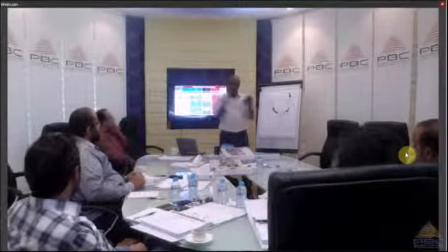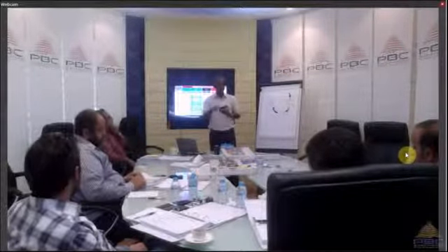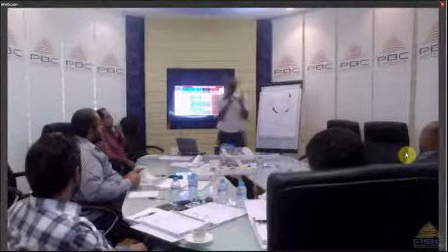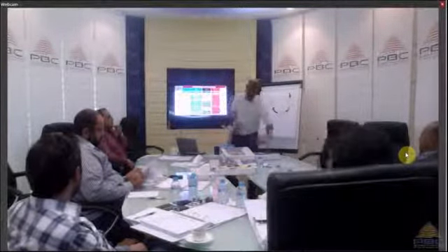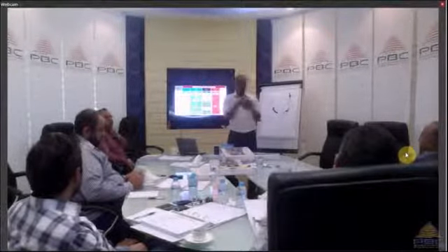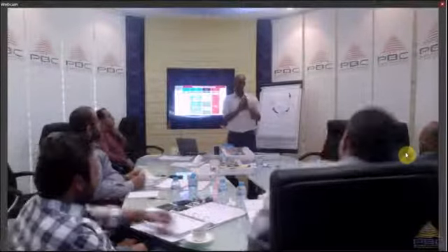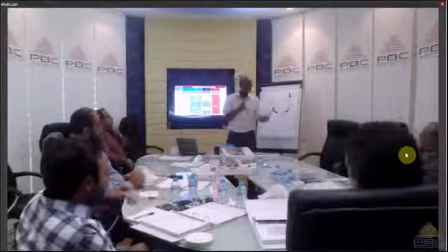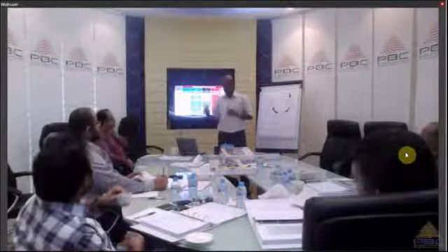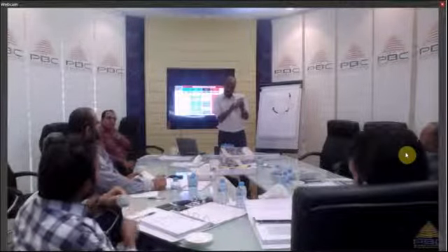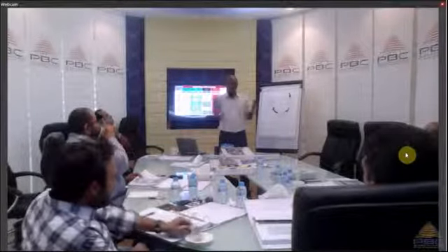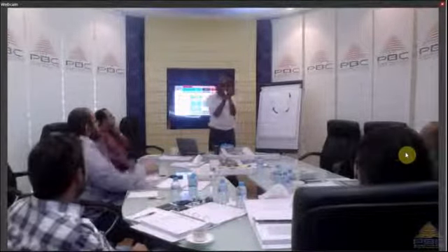What will be in your document to give it to me to sign as the agreed upon scope that you're going to deliver? So what are you going to have in that document? How are you going to describe this phone? The dimension, design criteria. Right. So physically, you will describe the phone, color, functionalities of the phone, configuration of the phone, quality of the material itself, maybe even the parts inside and all that. So you will give me a comprehensive description of this thing.